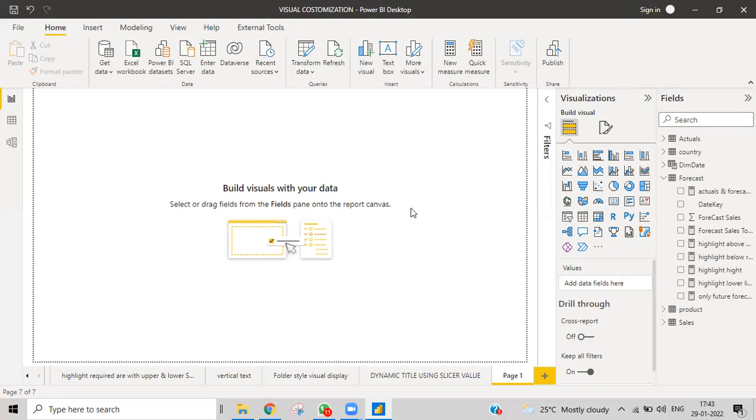So duration also you'll find with the start date and end date, how many days it took, and then you'll use that as a second stack. Obviously, the first stack you'll make white color, and the second stack whatever color you require. So you can have a Gantt chart made by stacked bars. Simple. That is your task for today.